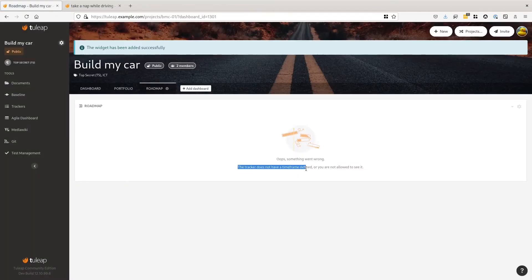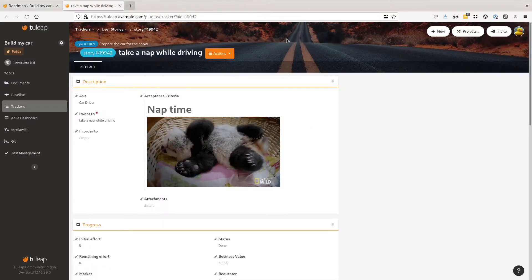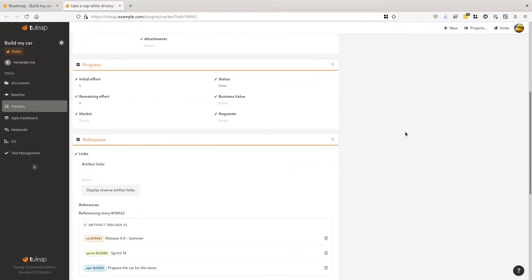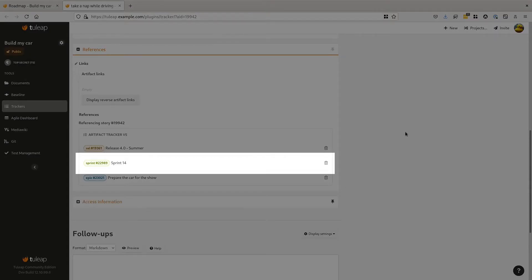It doesn't work because there are no start date or end date defined on our user stories. Let's take a random user story. As you can see, there is no date defined, but the user stories are planned for a sprint, and the sprint itself has a start date and an end date.